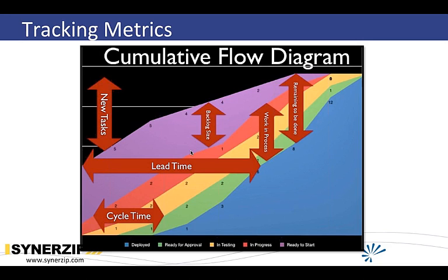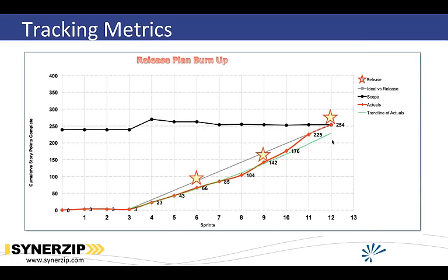This is more real data that they can use to see where they are. Lead time getting shorter and shorter over time. You can show that with a diagram like this, and so you can measure how much time it takes for it to be production ready, and there's a gap between cycle time and lead time. Lead time is when it actually gets to the customer. That's a big problem. Let's try to shorten that. You can see it does over time. Time goes left to right as things are getting added.